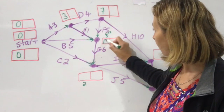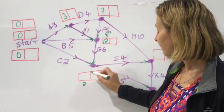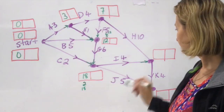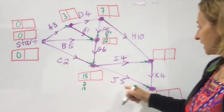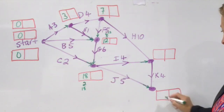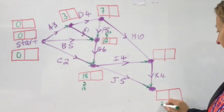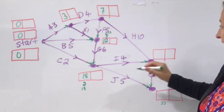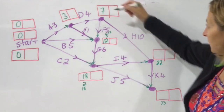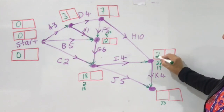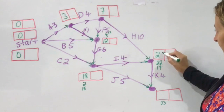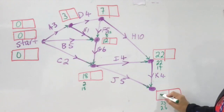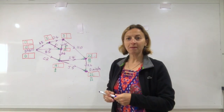The biggest option is twelve. Twelve plus six is 18, so my biggest option there is 18. Then 18 plus five is 23. There are two routes coming in there, so I have to be careful: 18 plus 4 is 22, and 7 plus 10 is 17. I'm looking for the biggest, which is 22. Then 22 plus 4 is 26, so that's 26.